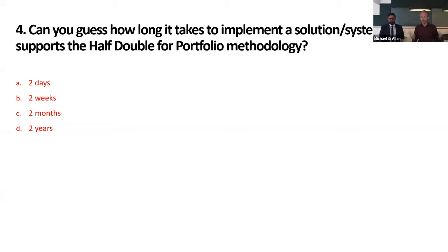You have a project and you can chop it up into 4 bits of impact. The first 2 bits can be executed in the first 3 months. So you execute those 2 bits, and then the portfolio committee says, okay, we need to put in another project for the next 3 months. So now we will put the 2 bits that are still lacking on hold for a while, and after 3 months, they will execute the last 2 bits.